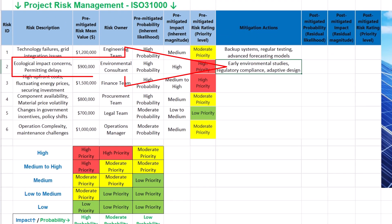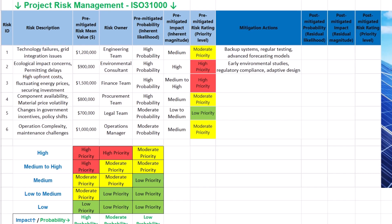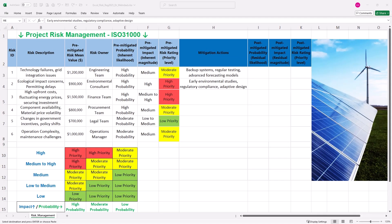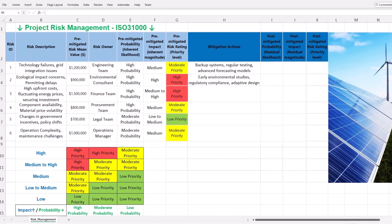Implementing early environmental studies, ensuring regulatory compliance and adopting adaptive design strategies are recognized as best practices for mitigating ecological impact concerns and preventing permitting delays. The European Commission's Joint Research Centre identifies best environmental management practices that help organizations minimize environmental impact and emphasizes the importance of early assessment and compliance. Conducting thorough environmental risk assessments and maintaining compliance with environmental laws are essential steps in managing potential ecological risks effectively.